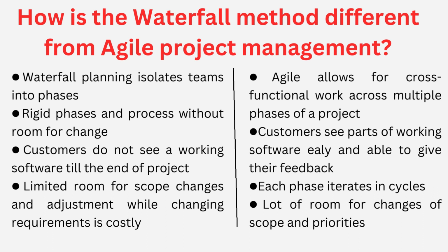Since an iteration can be anywhere between 1 week to 4 weeks, the client sees a new part of the working system in 4 weeks, at the latest. This is useful to rectify any issues with client feedback or any misunderstanding of the requirements, as well as adjusting the requirements to meet the customer needs. So this ultimately results in a perfect system that customers want.